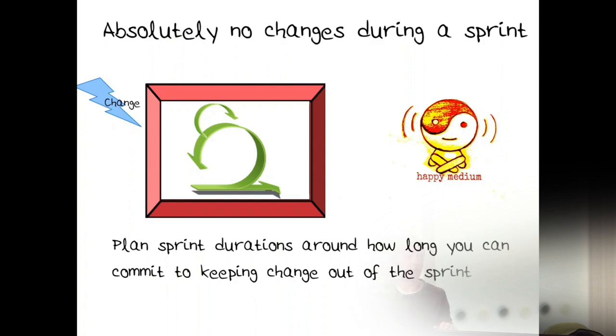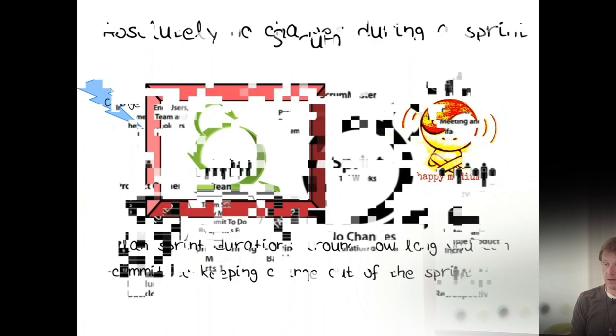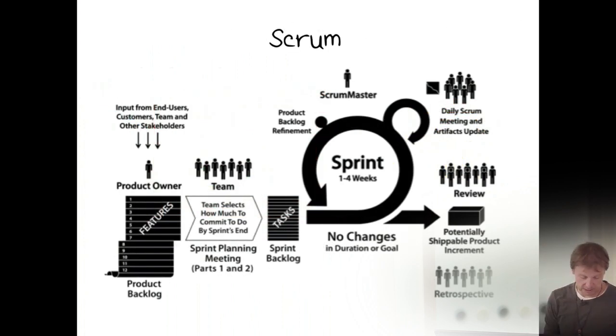So it's kind of a happy medium between product people interrupting the developers all the time and product people not being able to interrupt developers at all. It says that once a week when you meet with the team, you can say anything you want to the team. Ask them to do anything you want. We'll see, the team decides what they do. So you have the opportunity as a product manager to actually change things, but not during that week. And developers get this week with peace of mind from no changes. So we'll spend some time on this one, I think.